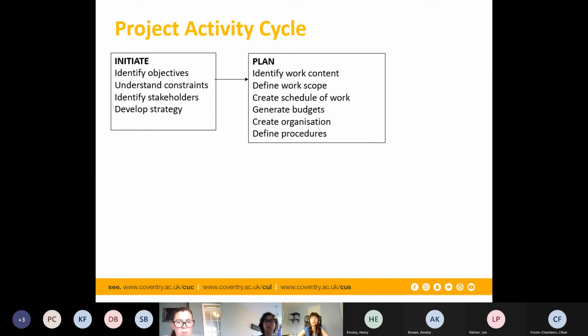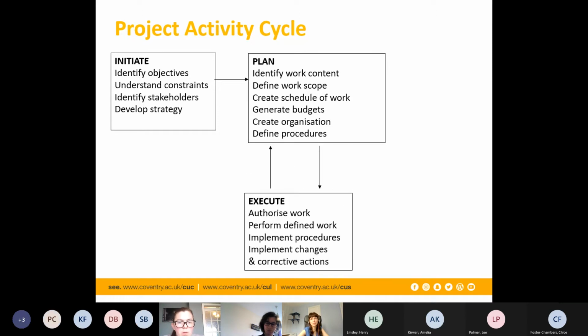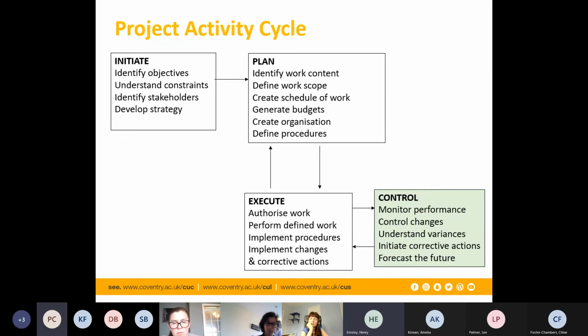From an operational perspective, we have the contract program, which is an agreed plan, and then in my role I produce a 3-week look ahead to show those activities broken down even further into construction activities. Then I have to as-built that as well, so I draw a red line through it showing what we've actually completed by which date. It's a process of recording and displaying what we've actually done against what we agreed to do.